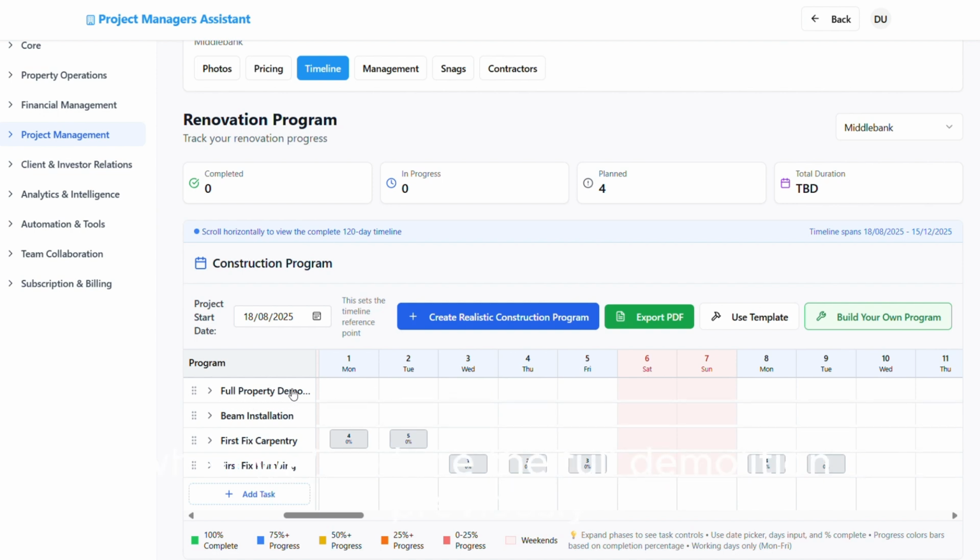When we've done the full demolition previously, we need to pull all the ceilings down. This allows the plumbing and electrical work to be done from underneath, drilling through the joists. That way you can inspect all the joists to see if there's any damage, any rot, anything that's going to cause you an issue going forward. And it stops you having to take floorboards up. The second you take a floorboard up, it is never going to be the same again. You're going to get creaks and movement in these floorboards.